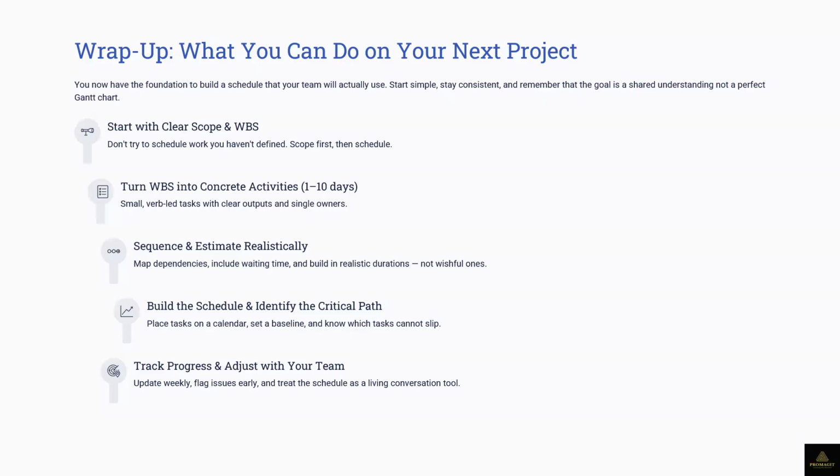And the scheduler will try to see, okay, 2 days, 2 resources, what can we do? Can we move things around? And if technically, as far as the schedule can't work out, it will tell you, sir, with these 2 resources, we couldn't meet that particular date. But with these 2 resources, we can still meet if we extend it. It is an iterative process. It's basically iterative.